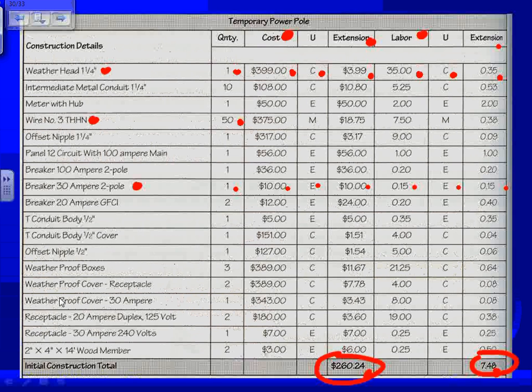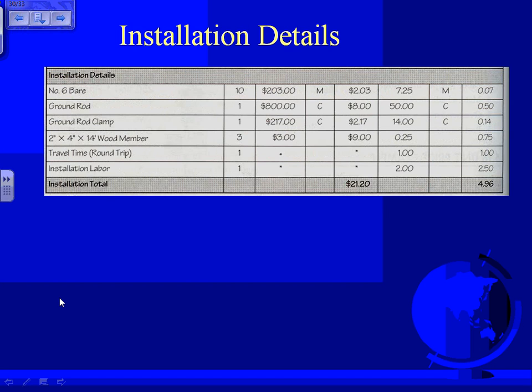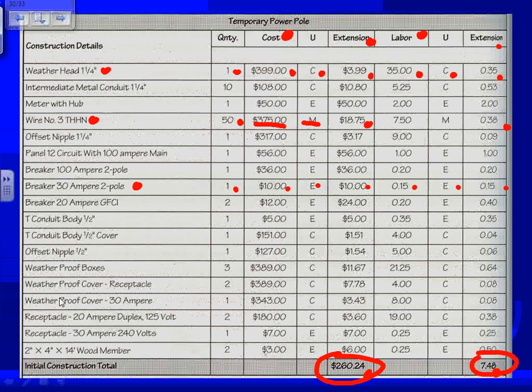Remember, this is not a residential. This is not a commercial service. And here's how much it's going to cost you per 1,000 feet. You extend it. And here's the amount of time it's going to take you to install it. 0.34 hours to install 50 feet. Make sense? Add them all up. Feel free, guys, to agree or disagree with the numbers, but you agree with the logic, right? Everybody knows what the logic is. They are assigning hours and dollars for all this equipment and extending them.